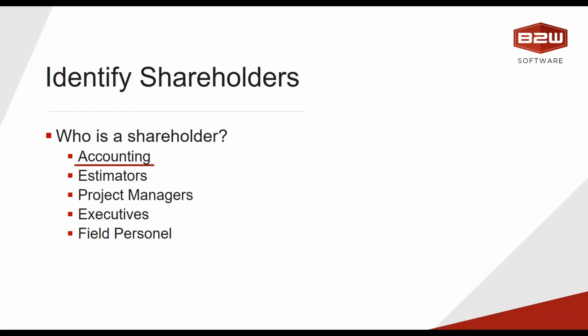Because it's not just an accounting function. To get information into your job costs, accounting structure, you need that information from the field. You need it from the PMs. You need the estimators to be able to assign it. So it all comes together. So having a well-rounded team is probably going to get you a list that's a little more realistic in what you can actually capture, and that's generally speaking a little less specific than what accounting might come up with on their own, but that's usually a good thing. And you can always add into it as time goes on.